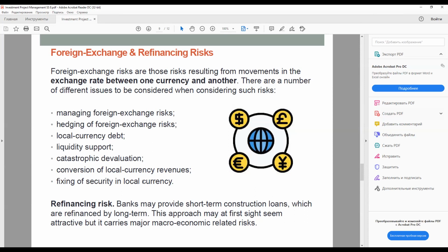It's clear. To deal with this construction cost foreign exchange risk, either the costs have to be redesignated in the currency of the funding, or the funding currency has to be changed into the currency of the costs, whichever is easier, and is also in line with the approach to the long-term operation phase. During the operation phase, if the project company revenues are in one currency and its financing or other costs are in another, movements in the exchange rate will affect its net revenues and hence its ability to repay the debt. Ideally, finance should be arranged in local currency, hence eliminating such long-term exchange rate risks. But in practice, this may not be possible in developing countries where the domestic financial markets are not able to provide long-term project finance debt.